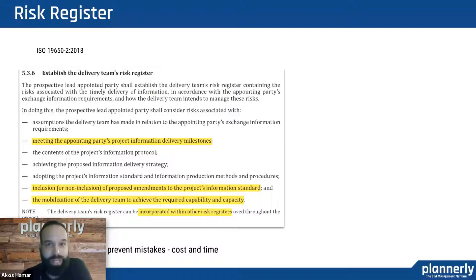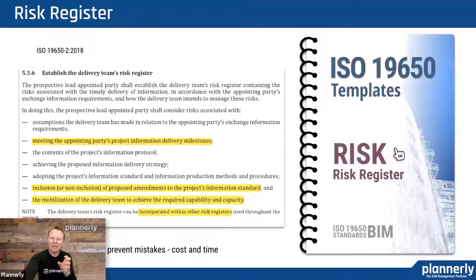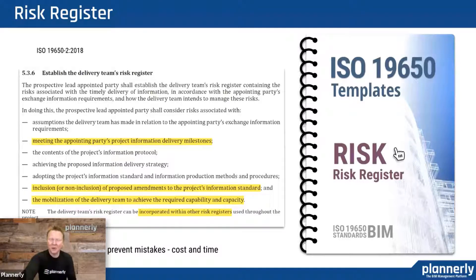So we are actually planning early. We do have a template for that as well. It helps teams understand which are the important risks, how to mitigate them, and assign them to an owner — making sure it's a complete loop, not just a checklist where somebody says they've got one. It actually has a workflow built in as well.